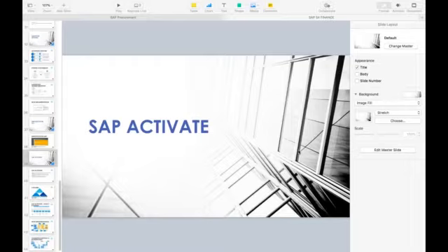So after all these repetitions, you will finalize the UAT, and then the customer is ready to finalize the date on which they will go live. And when they do the go live, you again need to migrate the data from their old legacy system and perform the data migration steps and all those things. And finally, you will go live, and then you start giving the normal support. So these are the normal 5 phases that we had in SAP Activate methodology.